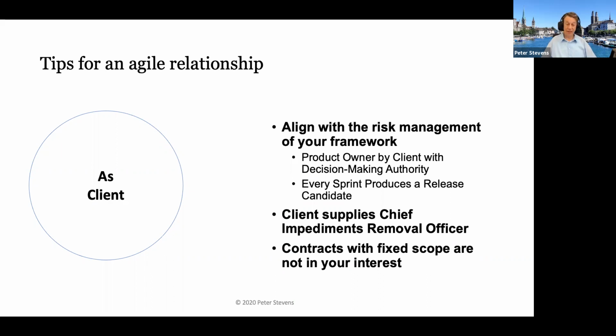That means they failed, because when the supplier has issues that need fixing on the client side, no one on the client side is going to care about that, or at least that's the pattern that I've seen. Now, if you're working in a complex environment, fixed scope projects are not in your interest. Think in terms of business goals and budgets. Ask yourself, how much is the solution worth? How much are we willing to pay to get that solution implemented? That's the basis for your negotiations.